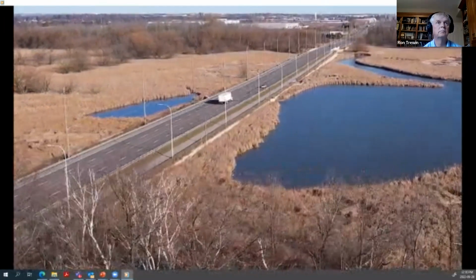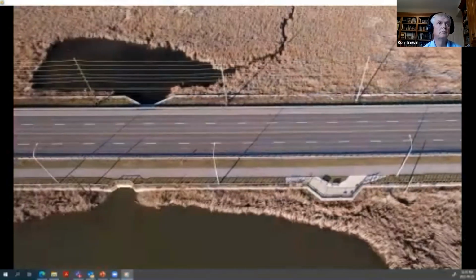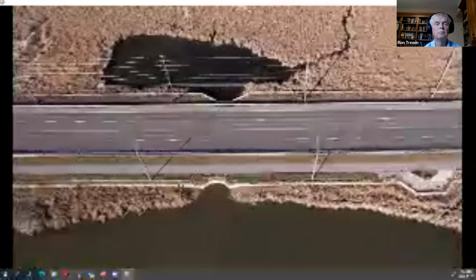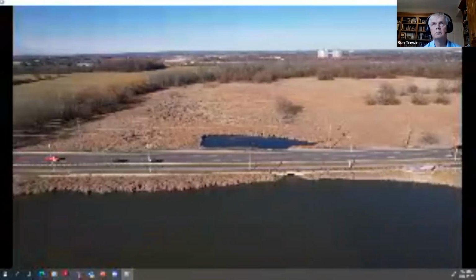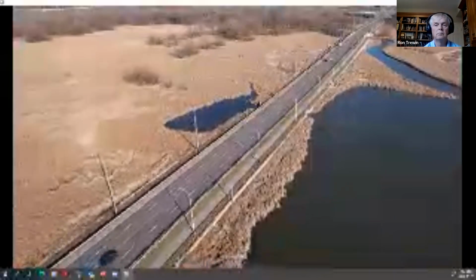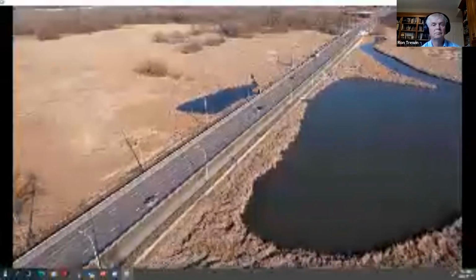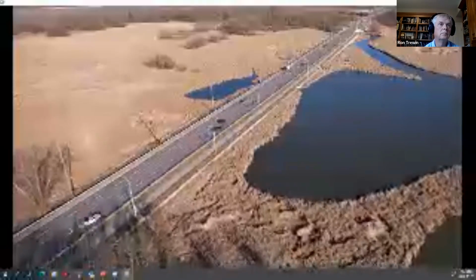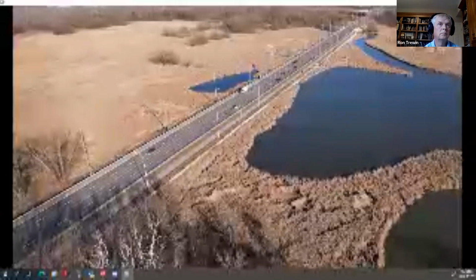The Victoria Street project, which spanned the sensitive wetlands of Lynde Shores Conservation Area, was completed over 6 years, widening 1.5 kilometers of Victoria Street from 2 to 4 lanes. To limit construction disruptions to traffic and to the waterfront trail, there were no weekday road closures, and 2 lanes of traffic were maintained. The project included 2 new structures crossing the Lynde Creek and Lynde Creek tributary, 2 wildlife crossing culverts, a new multi-use path, a soil system retaining wall, and a new storm system to direct drainage from open water.